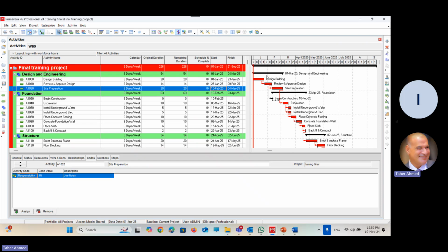In real life, you have to choose the second sorting criteria yourself. The first criteria is Start. The second criteria could be the name of the activity, or the original duration of the activity, where the one with less duration comes first, then the second one, and so on. So you are using a criteria for sorting the activities. Total float is just an example.